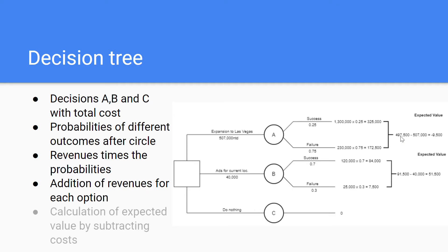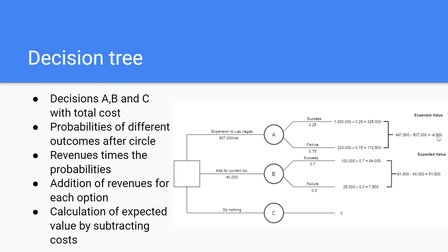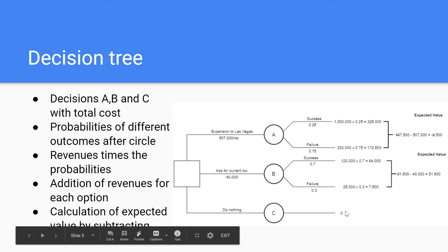Then for the last thing, you'll need to subtract the costs that you just wrote down here in the first line from the total expected revenue. What you will get at the end is the expected value, and that's the thing that you'll be comparing at the end. For example, in my decision tree you'll have the expected value of negative ninety-nine thousand five hundred dollars, and then for option B you'll have fifty-one thousand five hundred dollars, and then for doing nothing it's zero. If you compare it now, the fifty-one thousand five hundred dollars would probably be the best option as you can see.